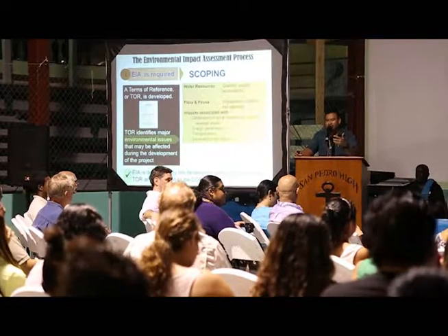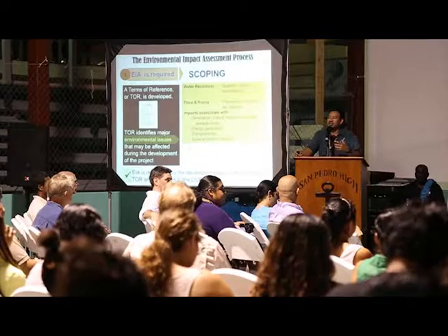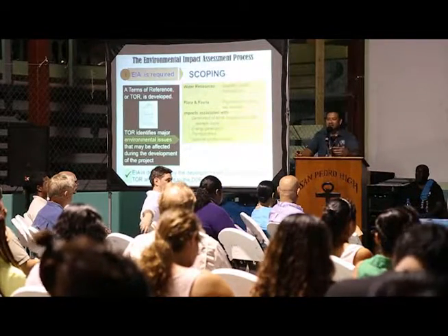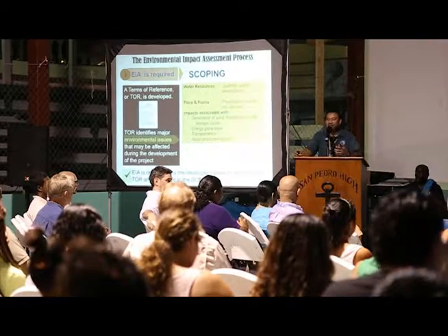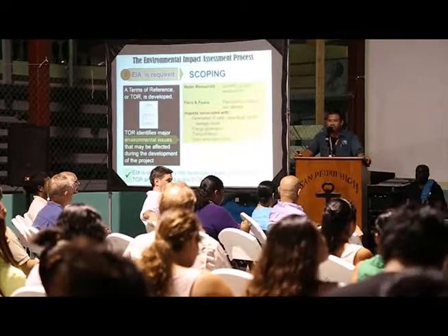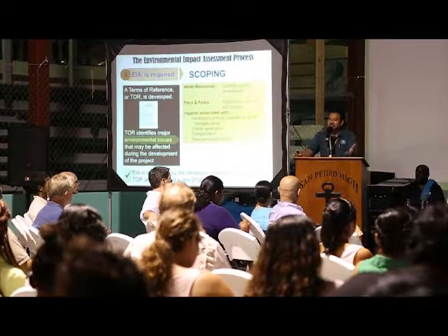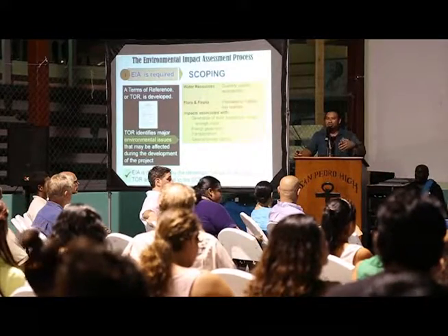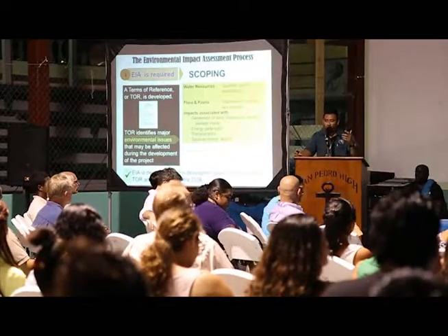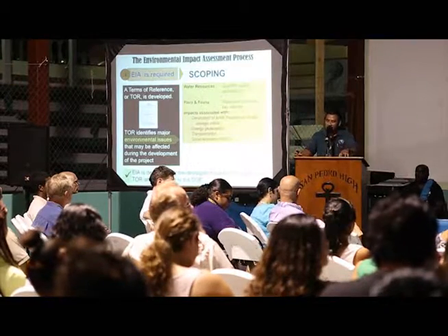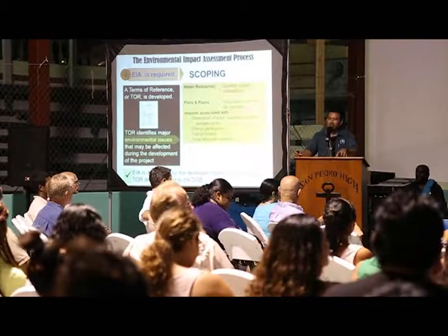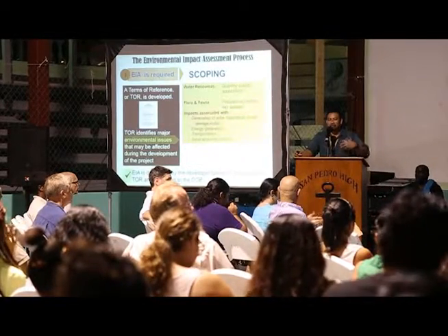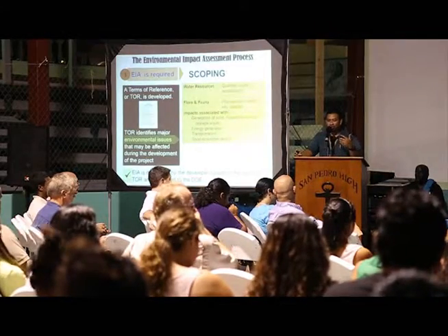And with any development, there are inherent environmental impacts, inherent health impacts. Where humans go, we will have inherent issues. So, what are these? These include liquid waste management, solid waste management, transportation issues. So the environmental impact assessment in the scoping for the Blackadore Key Island Restorative Projects, these were some of the major thematic issues that needed to have been addressed, and they are in the terms of reference.